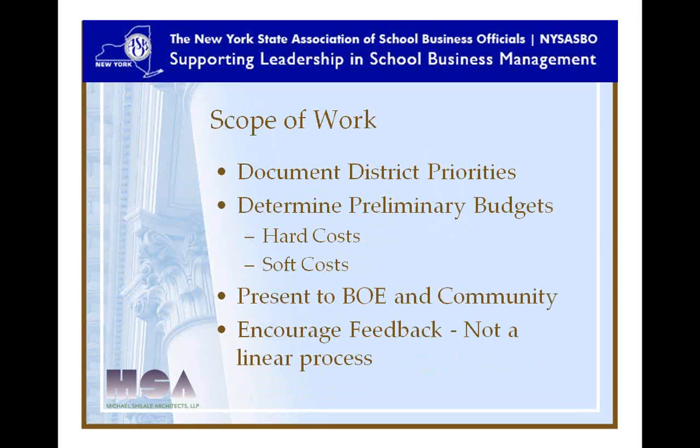So your scope of work is put together where we begin to document the district priorities, and then we can start determining preliminary budgets. And that's made up of the hard costs, which are the actual construction costs, and what we call soft costs, or what SED calls incidentals, which are your fees, your legal fees, your consultants' fees, any testing that has to happen. Interestingly, SED considers site work to be an incidental.